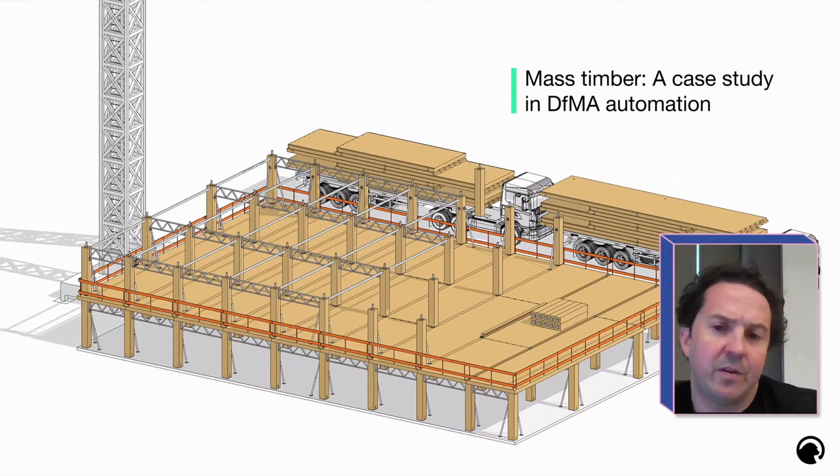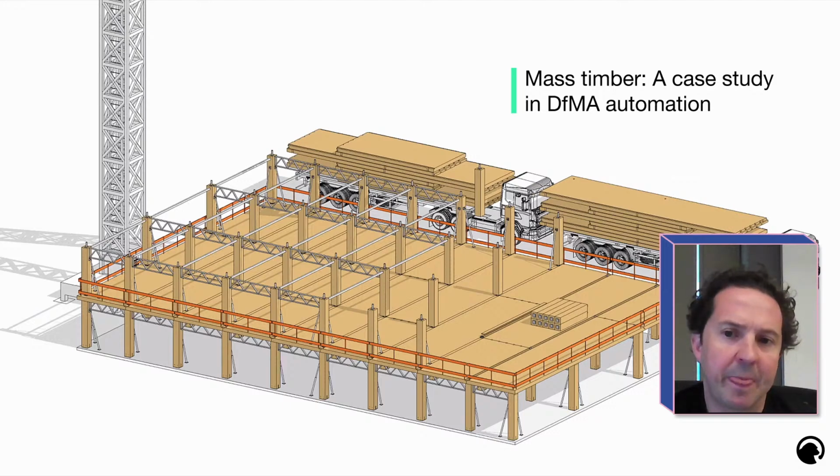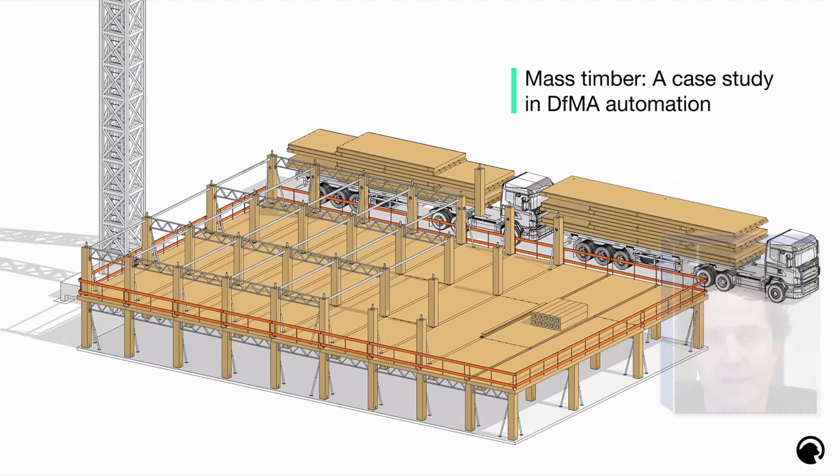So there was a research grant through the Australian government and also the wood industry. And really, one of the obstacles they came across was that builders or contractors weren't using it, not necessarily because they didn't know how to use it, but because of the sequencing and the safety issues and how to actually assemble it with all of the legislation involved.